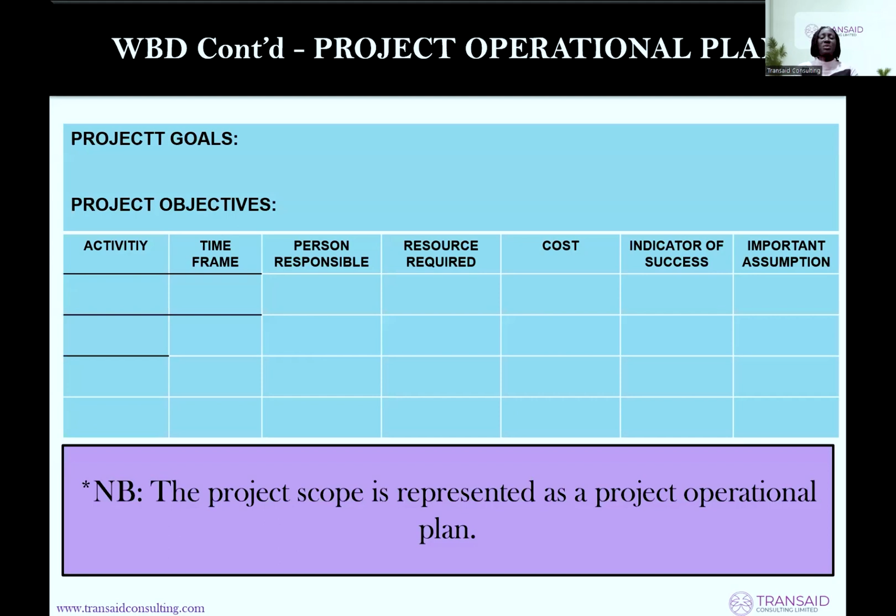And then you can also represent it as an operational plan like this. Activities, what is the time frame, who is responsible, what resources are required, the cost, indicators of success, important assumptions. You always make assumptions.